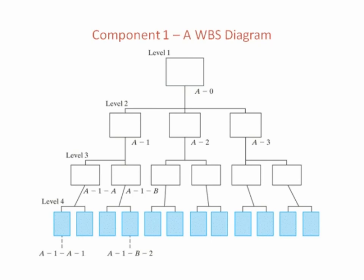This is a general diagram of a work breakdown structure. Any task is broken up into subtasks — level one might be 'build a building,' level two would be 'pour the foundation,' 'frame the building,' and 'put up the walls.' Each of those can be broken down into components, and those into subcomponents, down to instructions for each person working on the project.